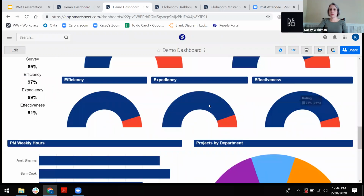These are some KPIs, and they're driven by a series of things that for my team, I had built into the sheet. We had a closure audit process to make sure that when everybody finishes a project, they do the appropriate closeout routine. And that would be something that was all triggered by just how they interact with the sheet. So really once I set it up, I didn't need to do anything to it. It was kind of measuring them through their process.